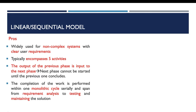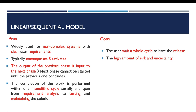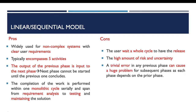For the disadvantages of this model: the user has to wait the whole cycle to have a release. Another disadvantage is the high amount of risk and uncertainty. This is due to two factors: first, an error in any previous phase can cause a huge problem for subsequent phases, as each phase depends on the prior phase. The second factor is its resistance to change and the need for correction and rework.